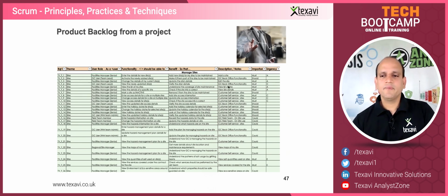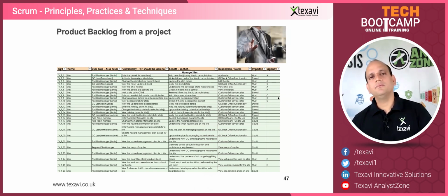Out of these, we've got how many musts? If you can just take a quick glance, you can see that the musts are not very many, right? Let's say about 12, not even 12, 10 must items are there, important and urgent. And then out of the 10, the A's could be very minimal again, right? There are some C's as well, the must. So if you just filter those out, the important is must and then urgency is A, you would end up with, let's say, about 10 or even 6.